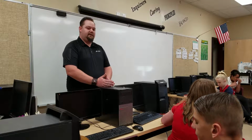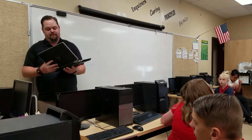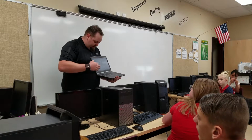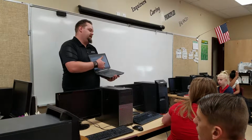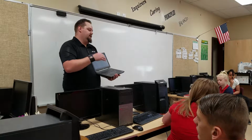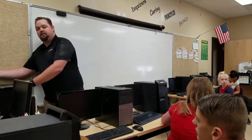And there's over 1,000 lines. On here, I know it's probably hard to see for some of you guys, but I have what's going on during the day, how long it's going to take per day, and then the dates it's supposed to happen. So every day I go through the whole schedule and write down what's supposed to happen that day, and then I walk the building and make sure everybody on site is doing what they're supposed to.